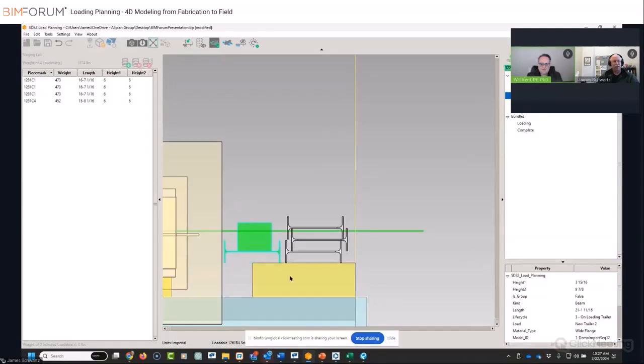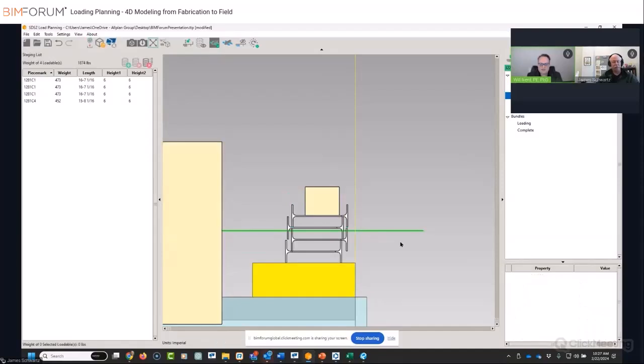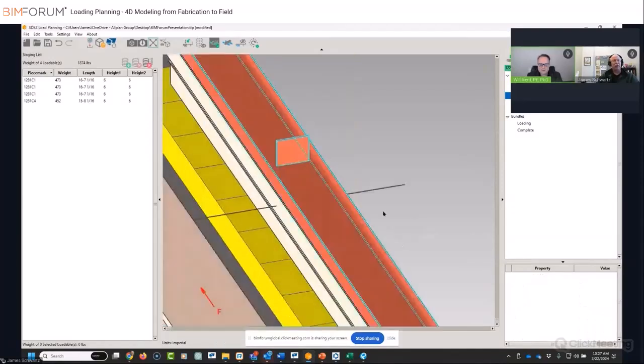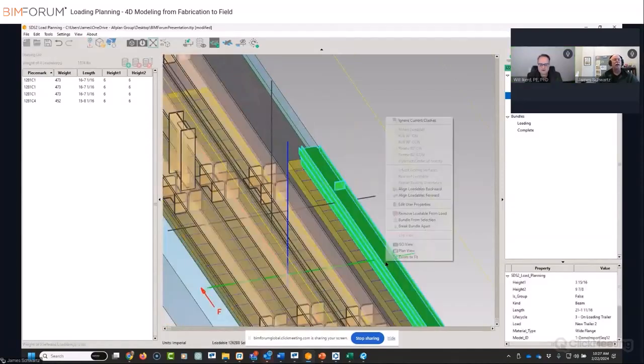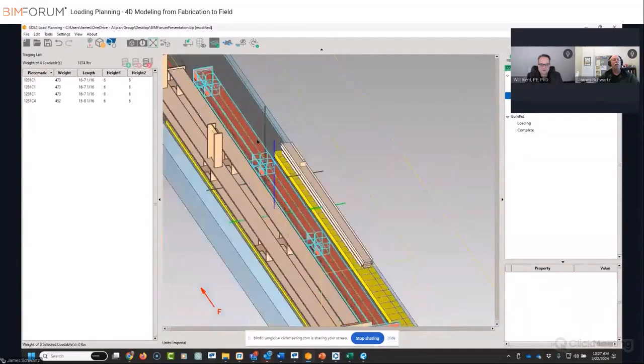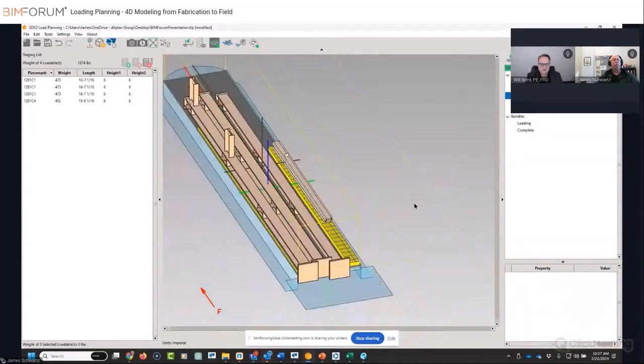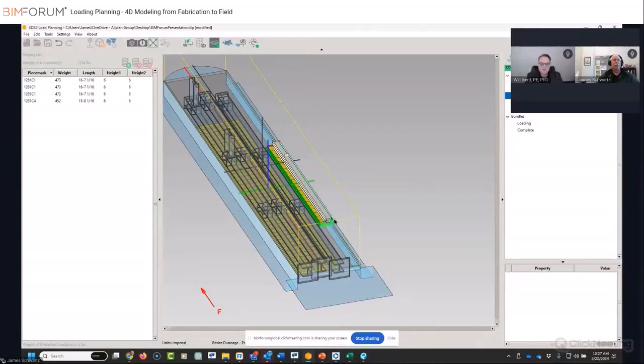So there's interplay here with the construction logistics and site layout piece. If your fabricators and erectors are using this kind of technology, you can actually write this into your BIM execution plans using the new BIMform Global LOD 23 spec, where you can start outlining your expectations of what the team would need to do if you wanted to utilize this workflow.